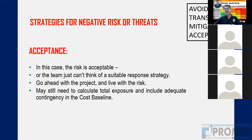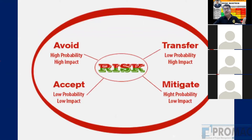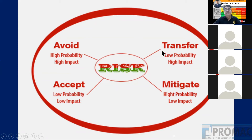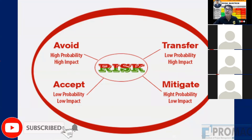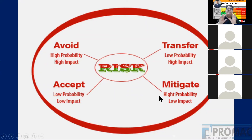Acceptance means we let the risk come and accept it. For low probability and low impact risks, we accept and put them on the watch list. For positive risks (opportunities), there are also four response strategies: Exploit — make the most use of the opportunity. For example, if cement drops from Rs. 300 to Rs. 200 or steel from Rs. 50 to Rs. 35, we purchase most of the material and complete as much cement and steel related work as possible — that is exploiting the opportunity.